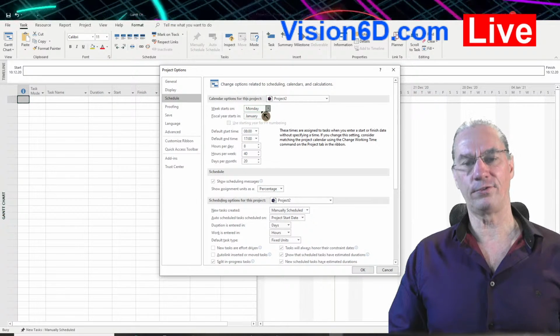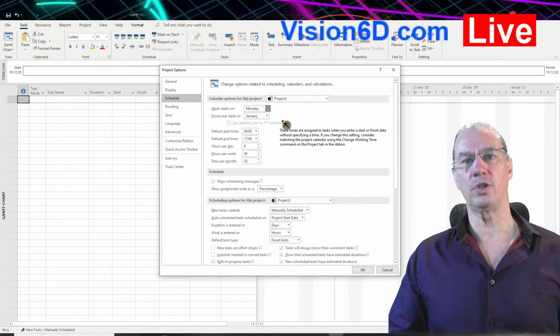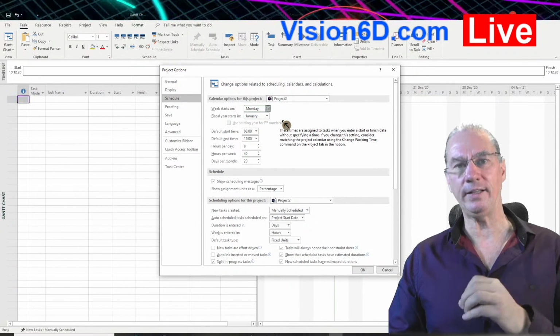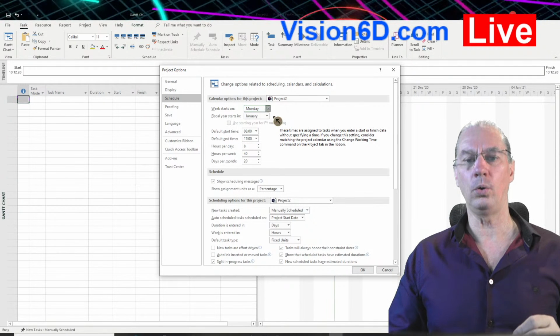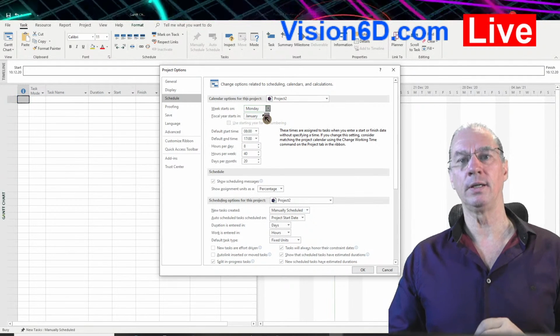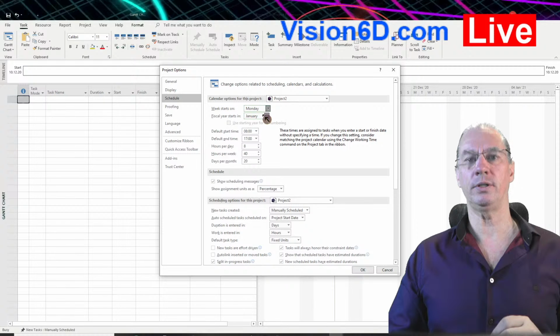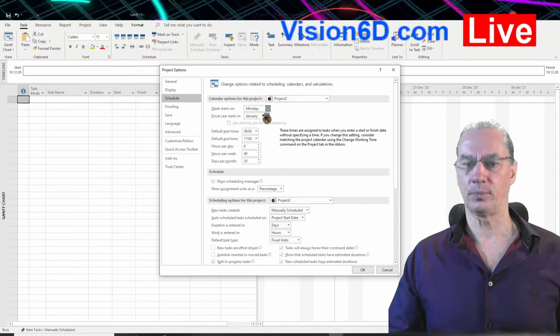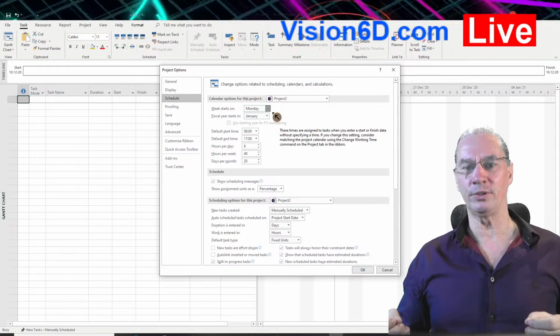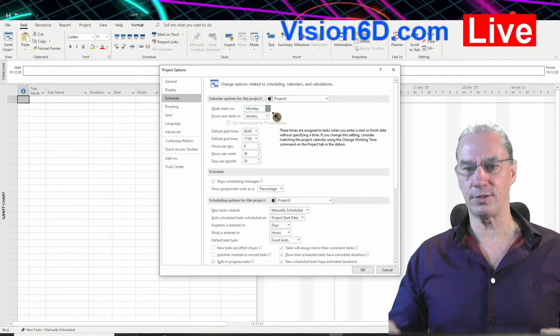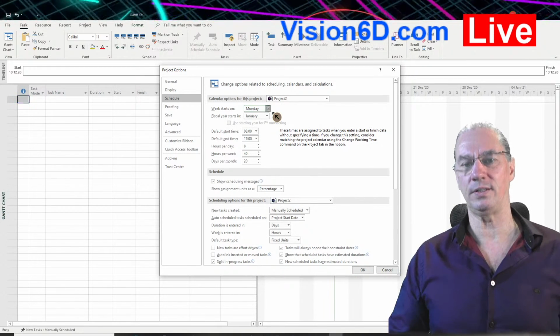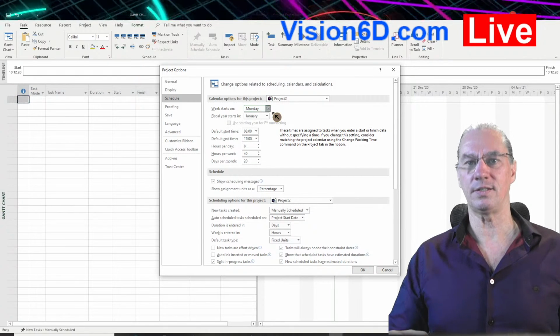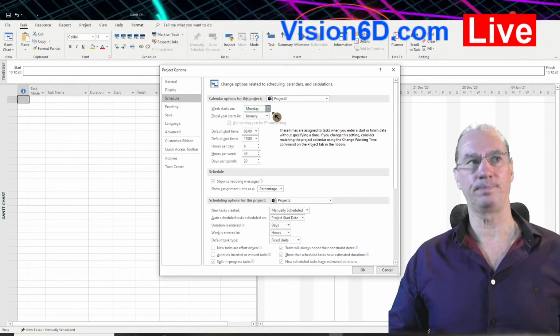If I didn't change this, all the planning would start from Sunday, considering Sunday as a working day. Maybe for you, in your culture, in your environment, it is like that. That's why you need to set it to Sunday instead of, like me, Monday.